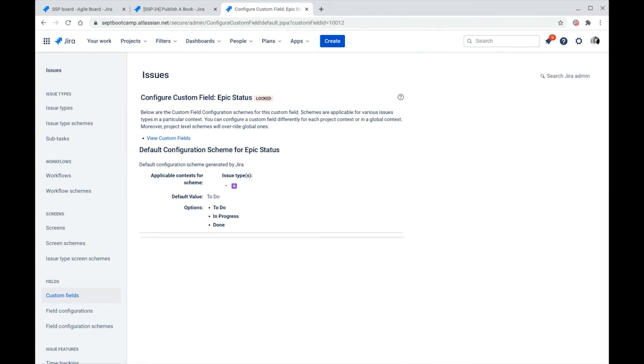we see that the field only applies to the epic issue type and it has three options: to do, in progress, and done. It's important to note that even though the field has status in the title, it is completely independent of the workflow status that an epic is in.